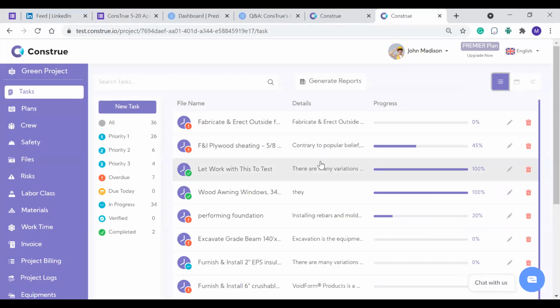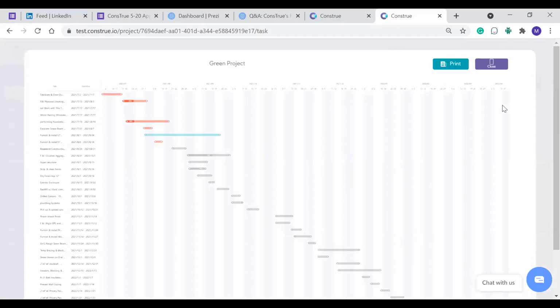Right. So if you can pop up the Gantt chart again. You see the dark red and the faint red. The faint red represents the time that is being assigned by the manager, and the dark red basically designates what time is actually started by the operation team, and how much progress is maintained right now. So you can pretty much keep track of what has been anticipated and what has been done so far.